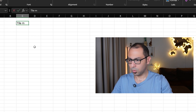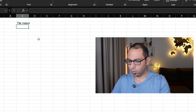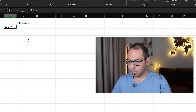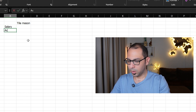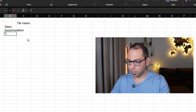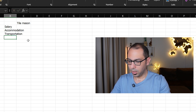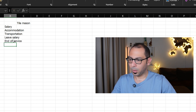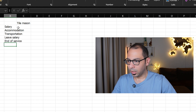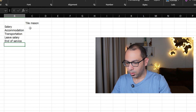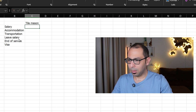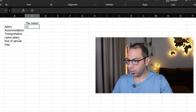Let's assume we want to estimate the cost for a tile mason. We need to know the salary of this tile mason, how much is the accommodation, how much is the transportation, how much is the leave salary, and how much is the end of service. The end of service depends on the law of the country, and there may also be a visa cost for this labor.